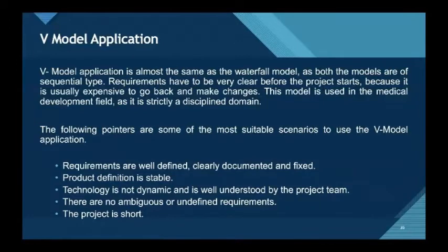V-model application. V-model application is almost the same as the waterfall model, as both the models are of sequential type. Requirements have to be very clear before the project starts because it is usually expensive to go back and make changes. So this model is used in the medical development field as it is strictly a disciplined domain.